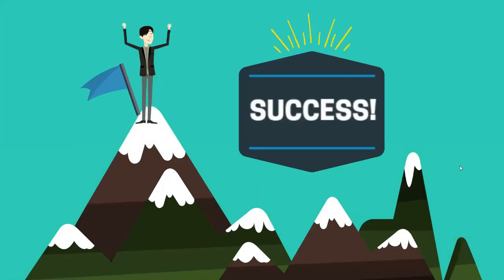Utility companies were a little excited about the timeline for our release. We originally thought we were going to try to release it in early 2019. But after going out and meeting with all the utility companies and talking to them, that's the start of a really busy construction time for them. And so they didn't want to be trying to learn our new system and be at the peak of trying to get the facility in the ground before the snow started to fly again. So MDT took that into consideration, and we decided to postpone the rollout of our new application. So we set the date as of January of 2020.